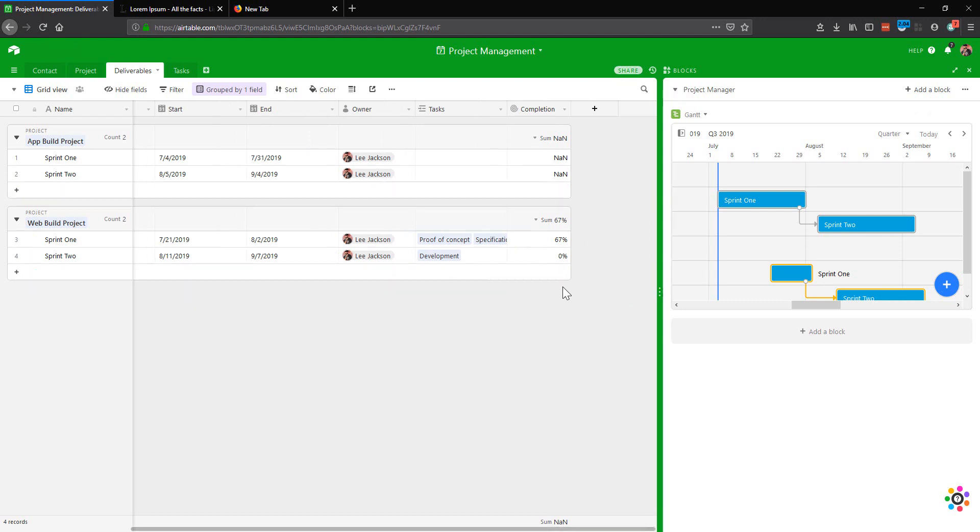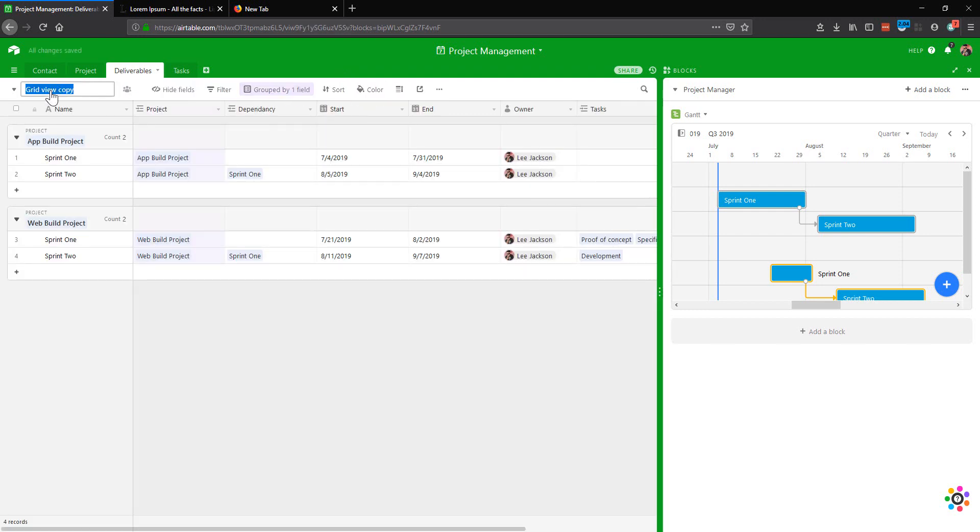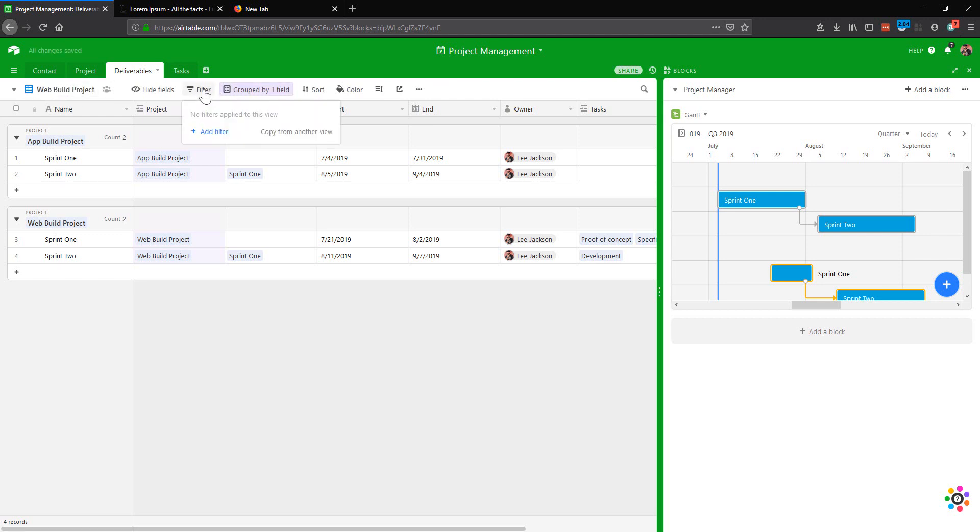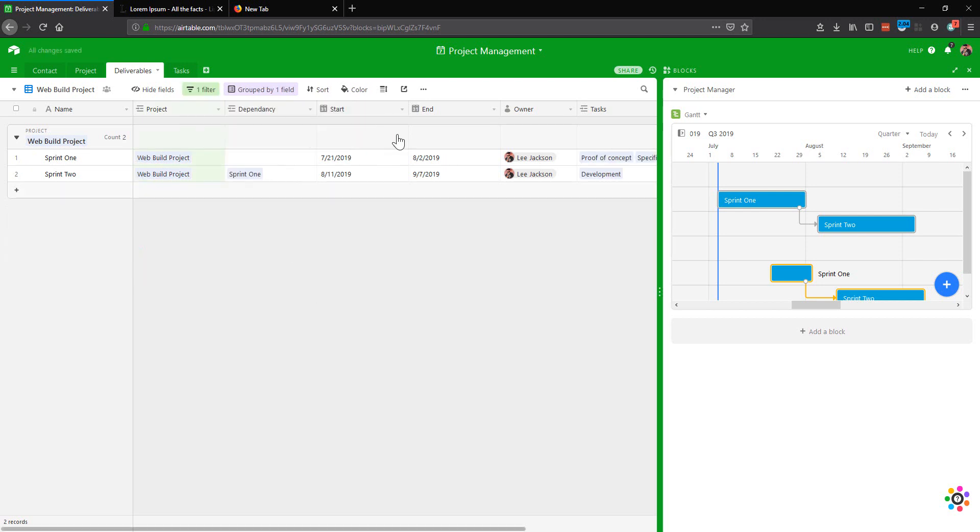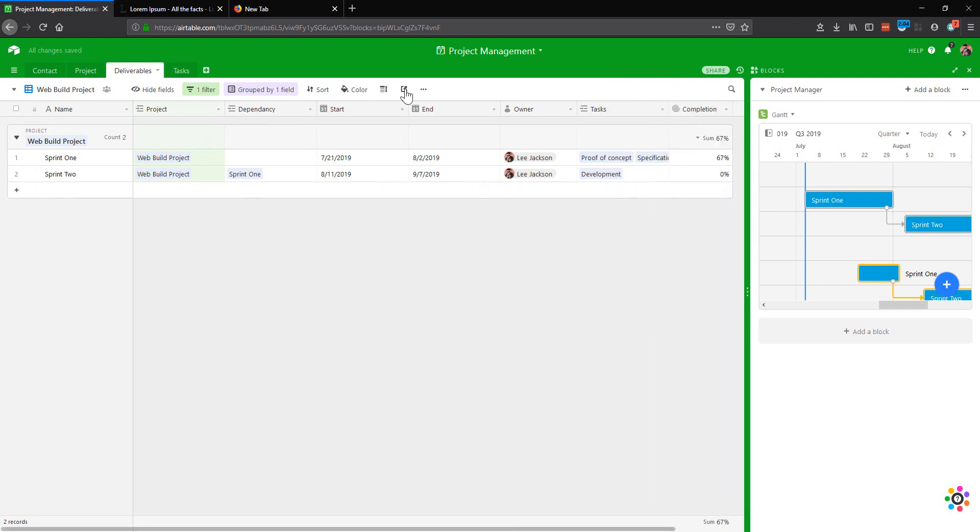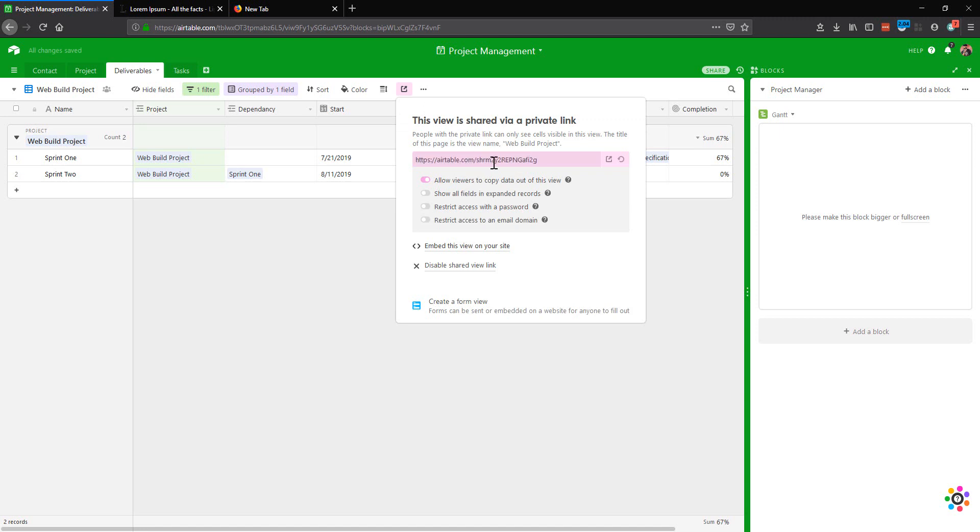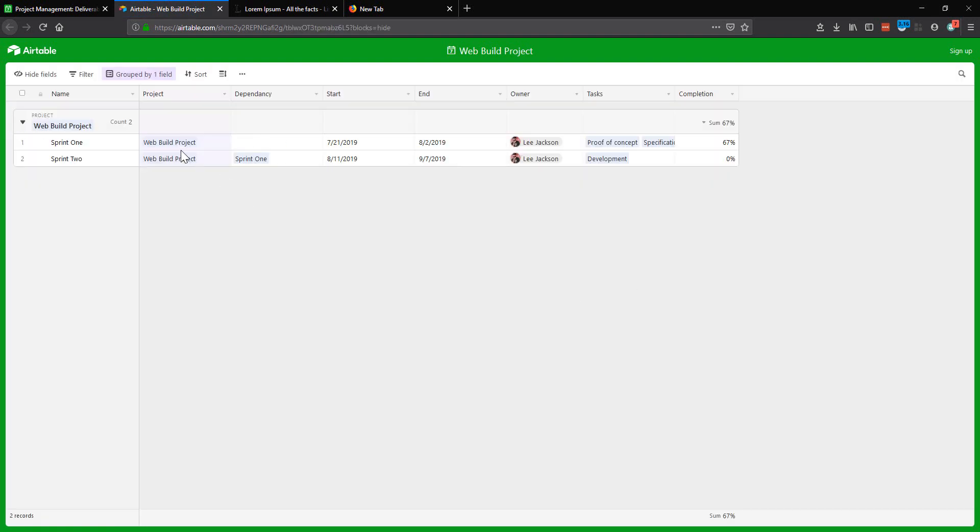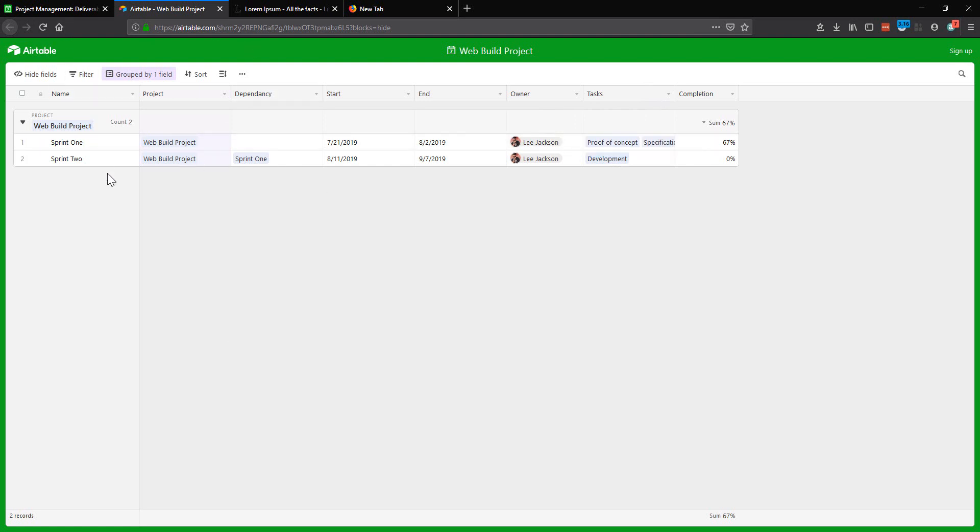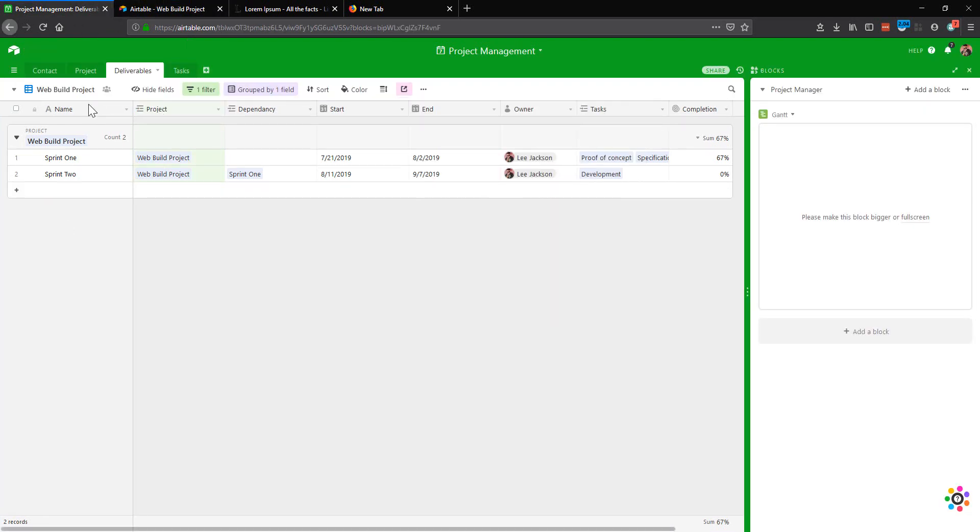You could then use this again to report to clients or send particular views. Let's create a view here for just one particular project. And then you could send this as a report to your client. So let's do the web build project. We're going to duplicate this view to web build project. And then we're going to filter this out so that the project is only the web build project. This gives us a report that we could in theory send quite quickly and just create a shareable link. And this link here would go out to our client and they would be able to see the overall status. So they can see here it's the web build project, the sprint, the dependency, start and end date, and the relevant tasks that are associated here as well.